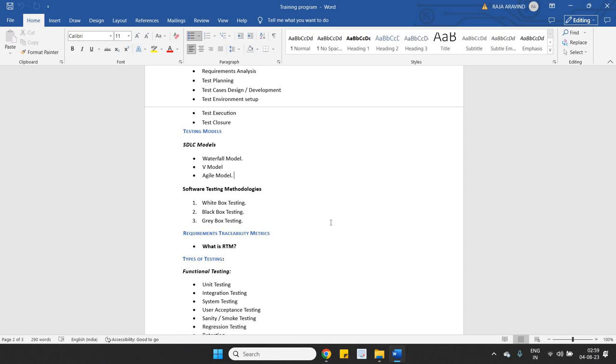If the organization agrees to adopt 2 weeks of sprint, then until the project is completed, it is only 2 weeks of sprint. So the first 2 weeks are done. In the first 2 weeks, around 5-6 user stories are developed. Then comes the next 2 weeks, and the next 2 weeks, and the next. So it's an iterative model. Every 2 weeks they will be picking up new user stories, new functionalities. They will be developing them and releasing them for the launch.